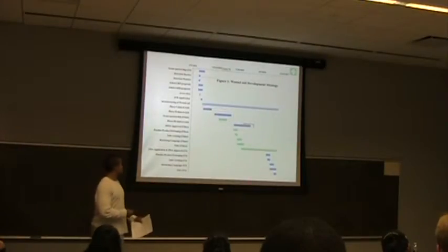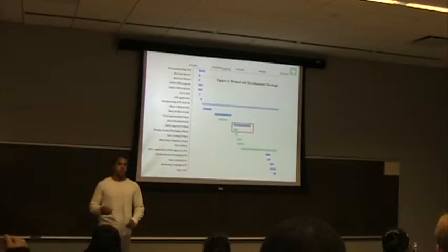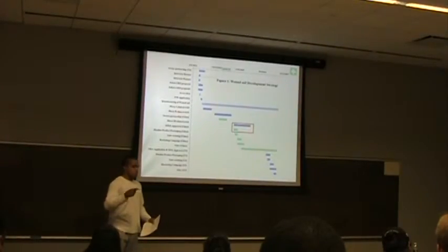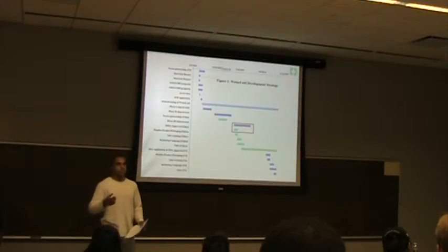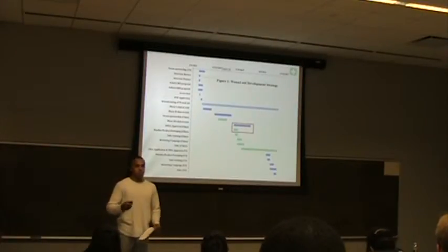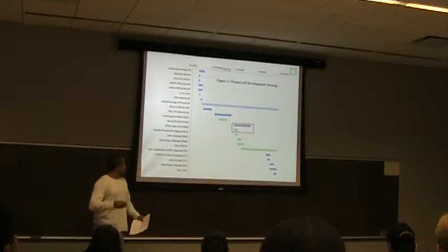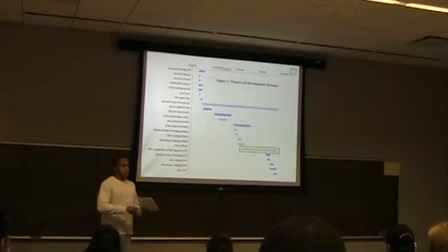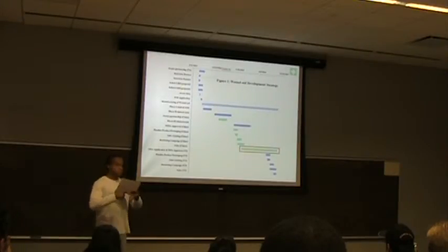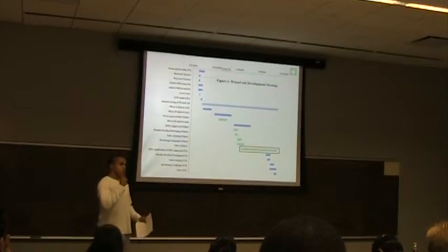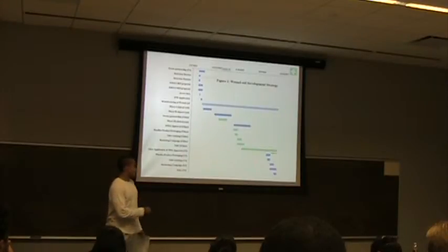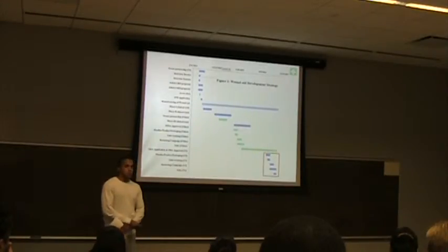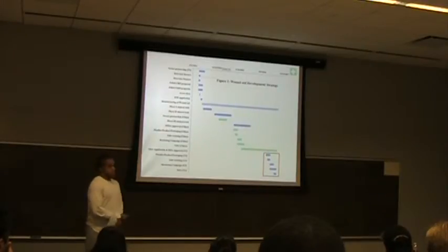The move into China will occur when phase 3 clinical trials start. This is possible because many Chinese pharmaceutical companies are willing to accept U.S. technologies that made it through phase 2 clinical trials. And then once we've received the State Federal Drug Administration approval in China, we plan to begin our sales of our wound aid product within China. And using these resources generated, we plan to facilitate sales and growth in the U.S. And the start date of this Gantt chart is tomorrow.